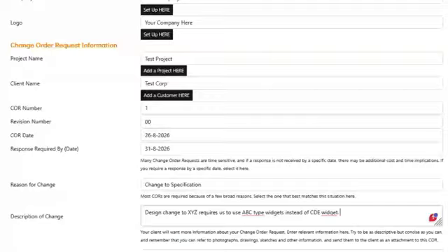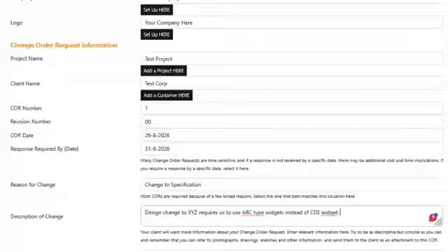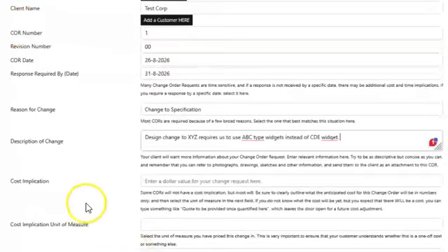And having been an estimator so long myself, I also know that leaving something out also has a cost implication. So you can't just say, oh, well, this thing was going to cost $5,000. We're not going to do it anymore. So now it's going to be a $5,000 saving, because maybe you have to do other things in order to leave that thing out. Or maybe you have to return materials and there's a restocking fee or something like that. So even an omission on a project is usually something that requires a change order.